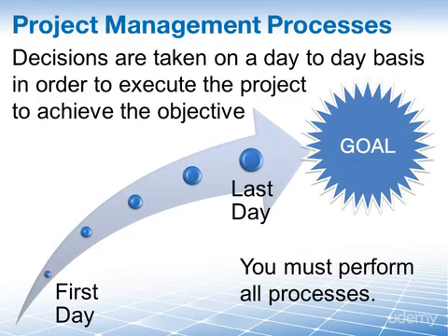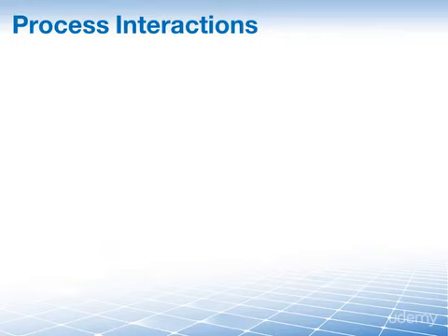For example, in many cases it's clear that there is a strong desire that a particular project result will be built in-house without the need for vendors. That doesn't mean that you can simply cut out project procurement management. You should at least do your due diligence and properly go through the plan procurement management process from project procurement management in order to make a proper make or buy decision. Once you have that decision, then you can decide how much or little of the remaining procurement processes are required on the project.